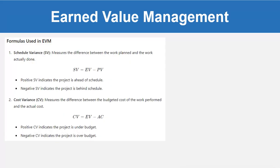Now let's talk about the formulas used in EVM. The first one is Schedule Variance (SV), which measures the difference between the work planned and the work actually done. The formula is: SV = EV minus PV. A positive SV indicates the project is ahead of schedule, and a negative SV indicates the project is behind schedule.